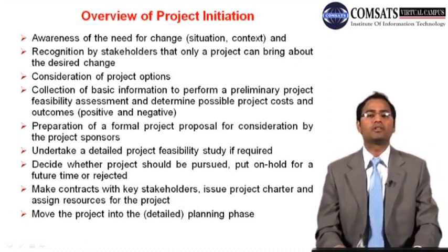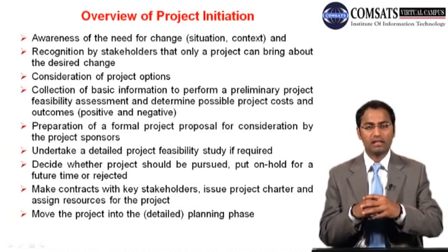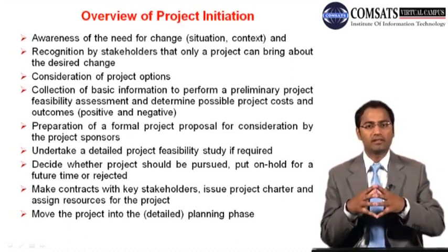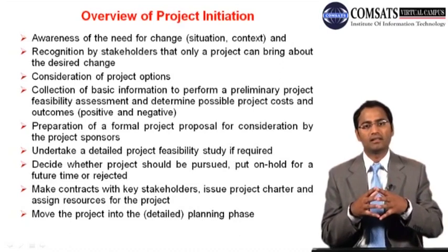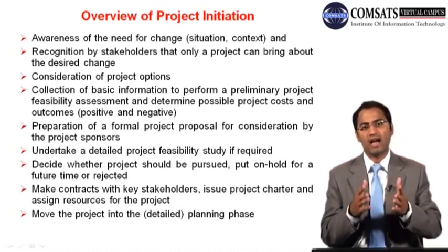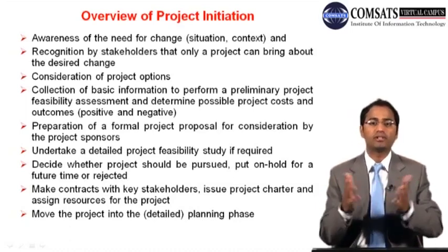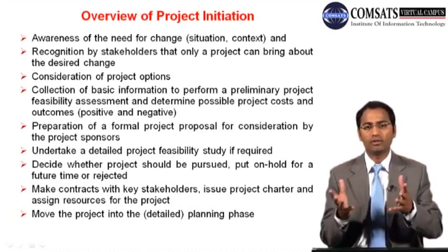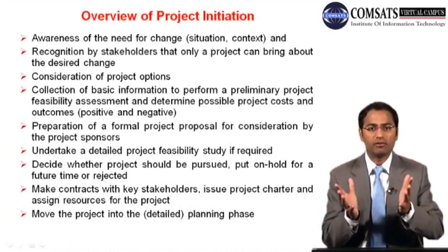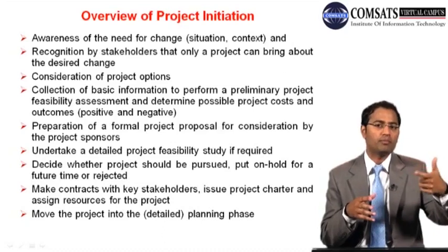I have been working on a project, and this is a good example of how people act. I was hired by a consultant, and they asked me to carry out a feasibility study for their client. So I did this study, and according to that study, the project was not that feasible. The payback period was 7 years, and the client had better options available. So the consultant came to me and said, well, this project is not feasible, so we are not going to get anything, so you actually make it feasible. So I told this guy, okay, but that is not possible for me, because either you change the assumptions, the rates on which we are basing the benefits.